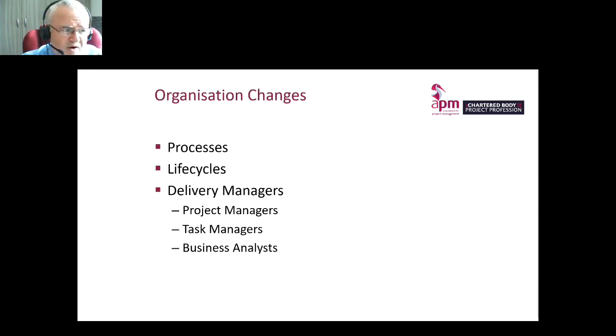We also had some organizational changes. We had to map out a lot of our processes and try to adapt those, and also incorporate the fact that we had this new system within those processes. This made us change some of the life cycles we had. Before, we had the Sellafield gated process, as it's called, which is kind of a one-size-fits-all process. So it was necessary to put some additional steps in, especially at the front end.